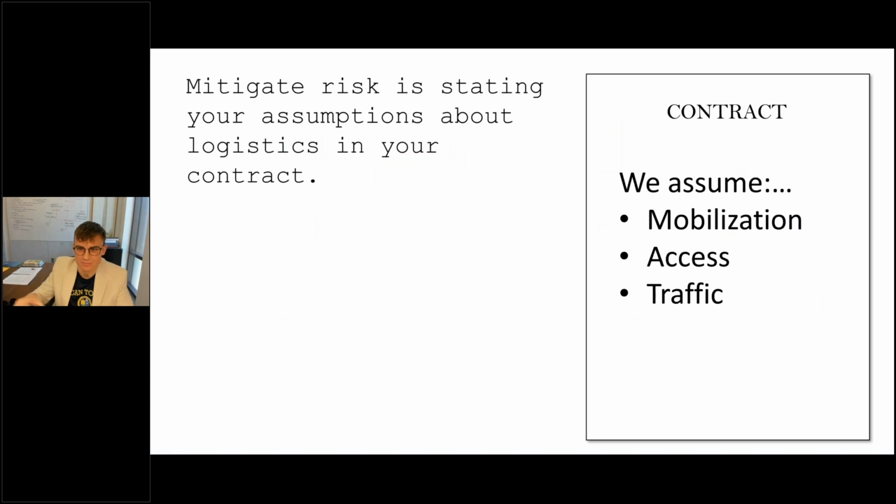And use the contract to protect yourself from things that can go wrong, unexpected logistical challenges when out on site. Specify things like mobilization expectations, access expectations, limited traffic expectations. Like, don't be demanding, just list these as assumptions.